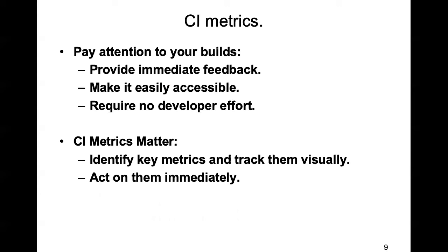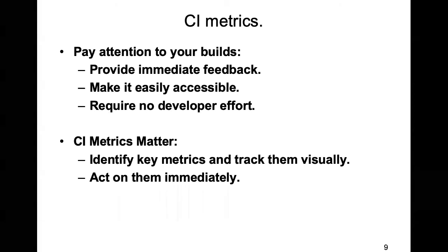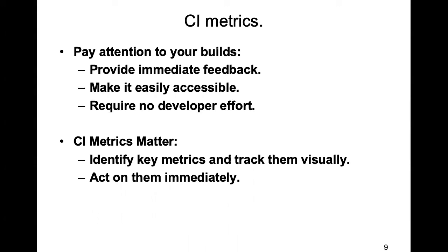So it's very important initially when a software house starts practicing CI to pay attention to the actual builds and make sure ideally every build is a successful build, as in all of the tests pass, and the deployment of the application to the staging environment, not to the production environment now, and the running of the system tests against the application running on the staging environment. All of that is successful almost every time you do a CI. That's the ideal scenario, but of course that's not the reality.